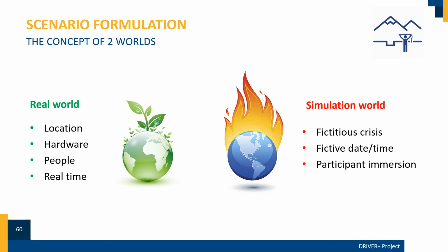Some of these things you can control. Other things like the weather and participants being stuck in traffic you cannot control. But you can think of backup plans and add contingency margins or buffers in your time schedule. The simulation world is fully under your control. You set the scenario used in the trial. You determine the time, date and location where the incident episodes play out.